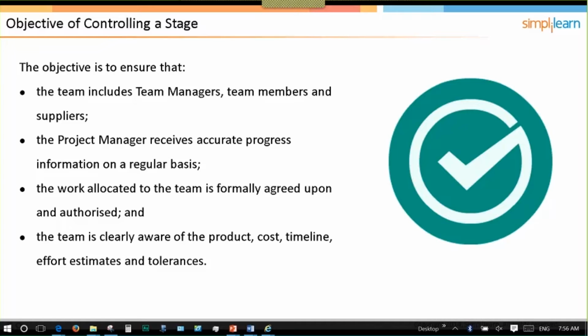So Vijay, is that what you're doing? Are you getting their approval before the individual sprints that you're doing? That's correct. So you're still applying PRINCE2. It's just you're overlaying it. Exactly. So I agree with Pranav's point in terms of the future enhancement. But what we generally follow is not the feature enhancement, but it basically gets added to my backlog, and we keep working on it as we proceed to my subsequent sprints. Yeah, so it gets prioritized, and when it gets to the top of the list, it gets dealt with.